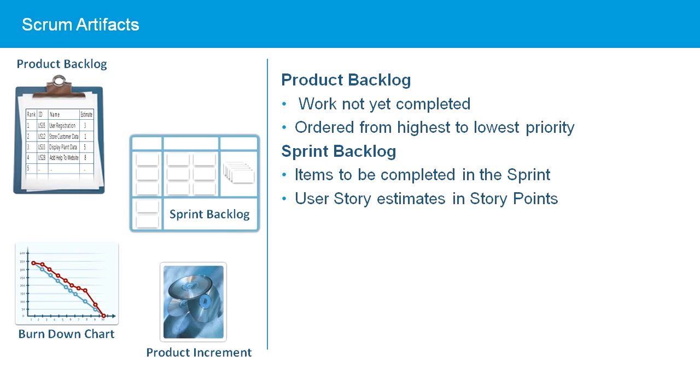As the sprint progresses, the user stories are moved from defined to in progress to completed and then verified or accepted. When all the tasks of a user story are complete and the acceptance criteria is met, the user story is done and can be included as work done in the sprint review meeting. The story points from done stories are included in the team's velocity for the sprint.